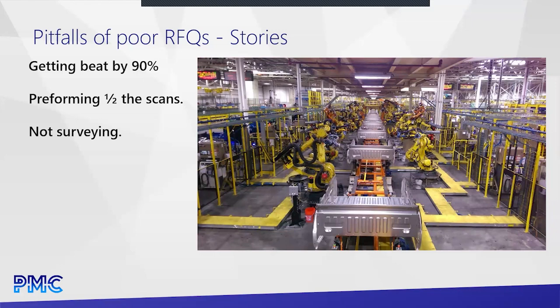So we got the call to come in and try to fix it. In this case, we actually ended up refusing to do the work because the scan quality was so poor that it just was not something that could be fixed. The job needed to be done over again. And this is very unfortunate because a lot of money had been spent and 6 months had been spent, maybe even more important than the money. And it just wasn't workable information. It could not be made to work.